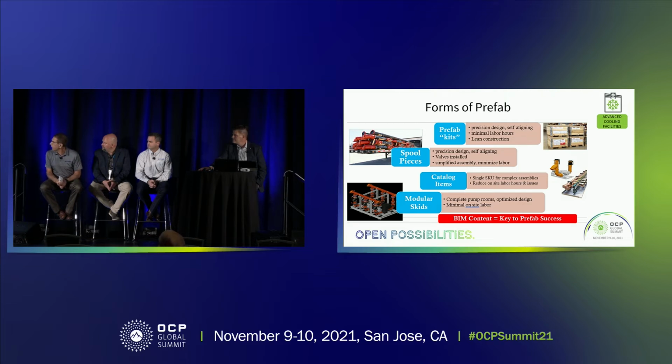You could have electrical modules that could be trucked in, in the 2 megawatt category. And to the point earlier, you don't have to have your pre-built electrical room, bring in that equipment and its conduits. These units could attach to your facility in literally 3 days through a junction box, and you're up and going with 2 megawatts of power, or 10, or whatever your configuration is.